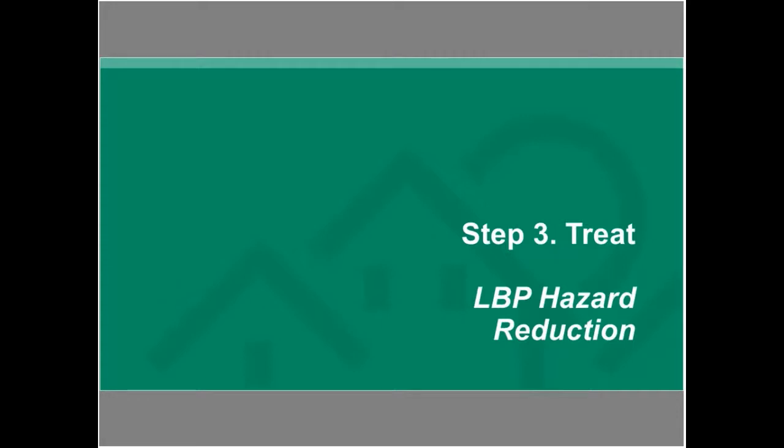We can have a couple of questions. A really good question that came in was asking how long a lead-based paint risk assessment is good for before a new one is needed. Jerry had let that person know that the inspection part of the report does not expire, but the assessments are generally accepted up to a year before requiring updating, and they should check their local laws to see if they have more stringent requirements. So that was another question that came in.